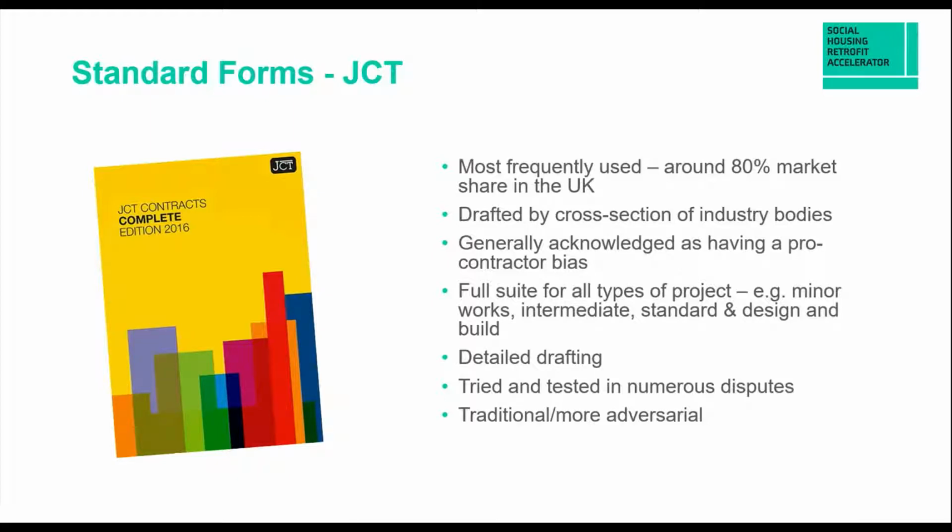ICHEME and that series of contracts are usually used for process plants, and the PPC 2000 contracts are used for more complex projects where you might want a partnering approach and you would have a designer, a contractor and the client all working together. So the latter choice of contract really will depend on the delivery model chosen.